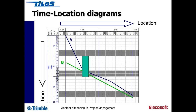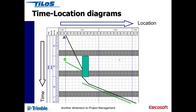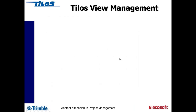You also have physical obstructions — things like bird nesting season at a particular location, or a field not being released to the road route for legal reasons until later on. You have to find a way around that, and there are elegant solutions in TILOS that are more difficult to find in traditional software. That's the benefit of time-location, time-chainage diagrams — they're all the same terminology.